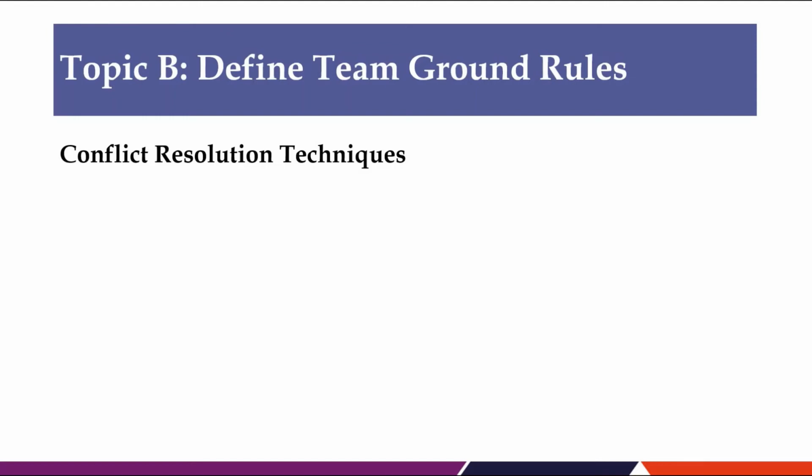Conflict is best resolved by those involved in the conflict. The project manager should generally try to facilitate the resolution of problems and conflict as long as they have authority over those in conflict or over the issues in conflict. If not, the sponsor or functional managers may be called in to assist. There is one exception. In instances related to professional and social responsibility, like someone breaking laws or not following policies or acting unethically, the project manager must take the issue to someone higher in the organization.